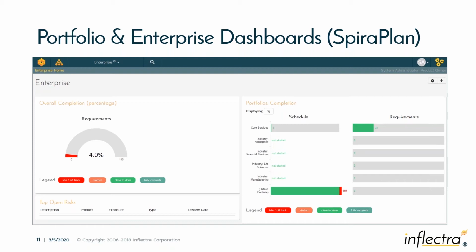completion. In the past, you would primarily look at completion of things like test cases. Are my requirements tested? Is my release tested? Do I have tasks that are done? There was no overall completion at a product level, at a program level, and certainly not even at a release level. So we've now consolidated those metrics into a new single metric, which is completion percentage of a release, a product, a program, a portfolio, and you can view that at different levels. That way you get a top-down project and program management view of the system.